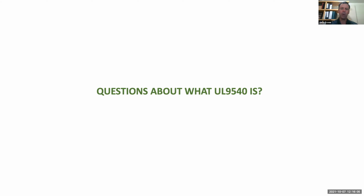Yeah, and follow up on that, David, too. We're seeing the rules for 9540 are not being universally applied. It's still such a new standard. So, below 20 kilowatt hours, no questions asked, shouldn't have any problem getting approval from the AHJs. Above 20 kilowatt hours still might be possible. We have a lot of systems installed with Discover above 20 kilowatt hours, but you definitely need to clear that with your AHJ first.